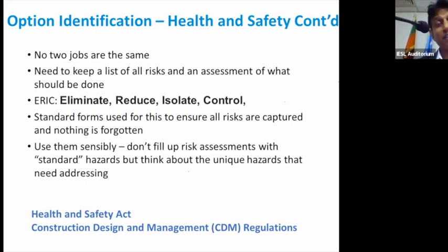I would say that in the context of awarding contracts, that is an area we have confirmed on, and you have to give marks. It has to be included in the tender stage. This is what's happening in the developed countries. The marks will be low if you have a low health and safety report. Sometimes people lose projects based on health and safety. That's why they put a lot of effort into maintaining high standards.